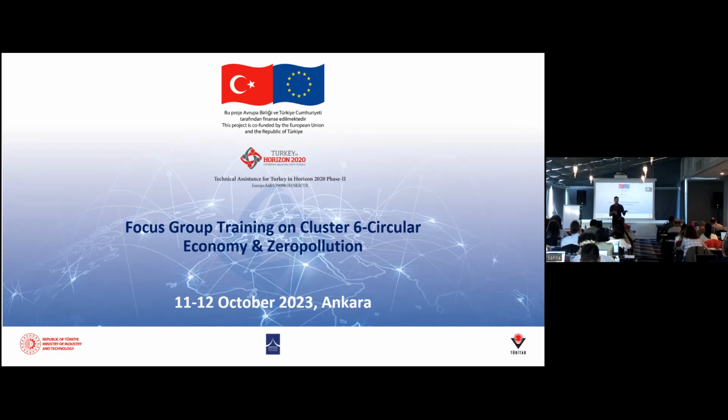So that's why one of the extra target groups that you have in communication, and in many cases you don't have for the dissemination, is citizens, because the results by the end of the project, you don't expect them to be used by the citizens. Why? Because if it's a research innovation action, the maturity of your solution, the TRL, is going to be 5, 6, 7, something like that, not more than that. So still you need to do some work in order to make it ready for people to use it, in order to reach TRL 9. What is TRL 9? When you have the complete solution ready and it penetrates society, penetrates the market. So you see how all these things are very well related.